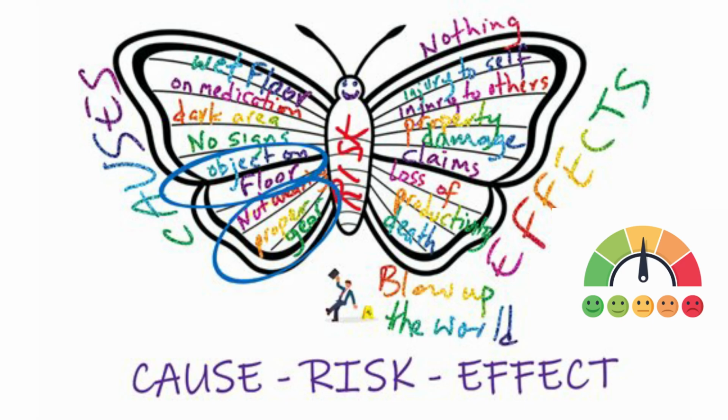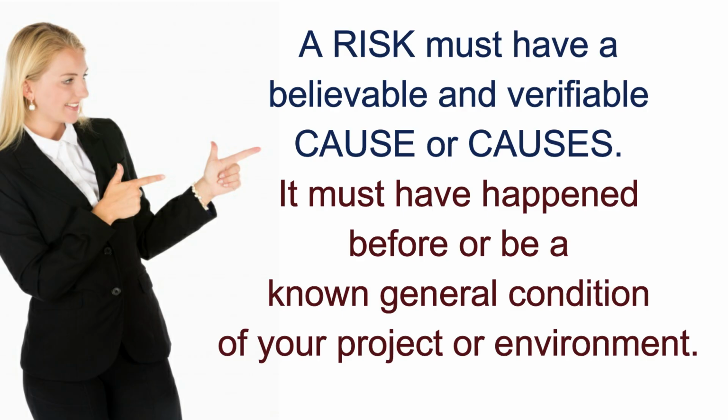All right, so let's just try to put some structure to this. A risk must have some causes, one or more causes, for it to happen. There is no risk if there's nothing that causes us to be concerned. What is going to cause you to be concerned? Something that is a fact, a realistic condition, a general condition. It could be the economy that worries you about some risk to your business. It could be constant currency value fluctuation that worries you about some aspect of your portfolio. But there's got to be some general conditions that we consider facts, non-negotiable facts, that would have to be there to give rise to the possibility of risk.